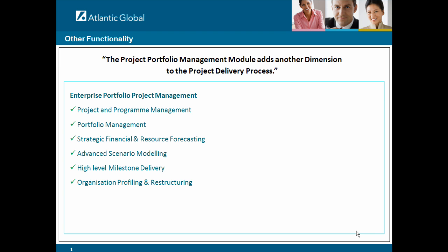The Project Portfolio Management module lets you define a project hierarchy to help manage hundreds or thousands of projects. You can also use the Portfolio Builder to select and deselect projects from any program into a single project portfolio. Typically, customers use the project hierarchy to group projects into programs of work. It is worth noting that you can add up to 10 levels in the project hierarchy.